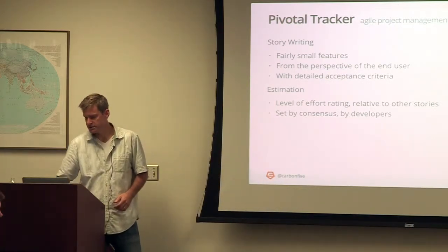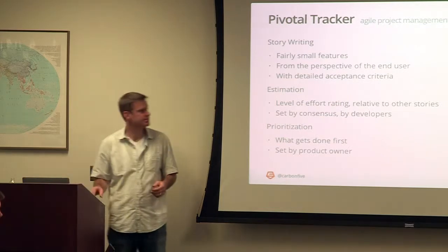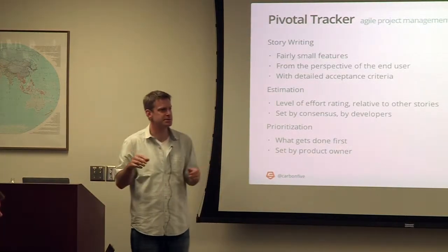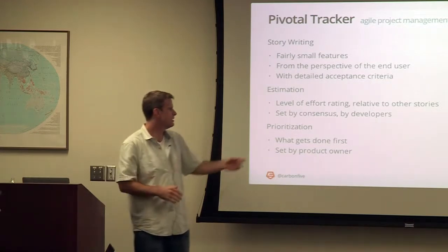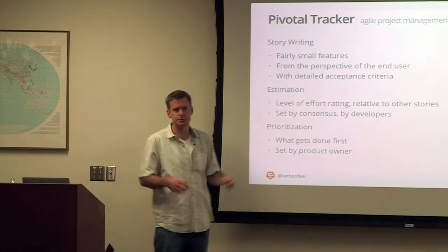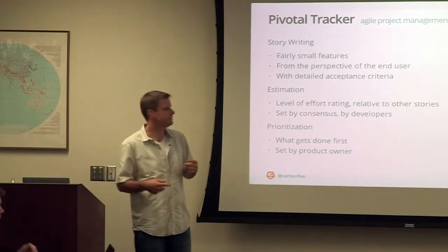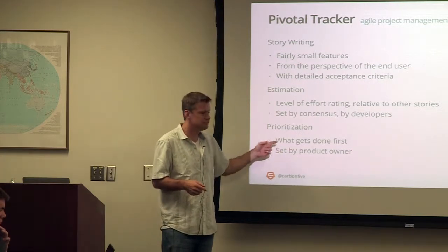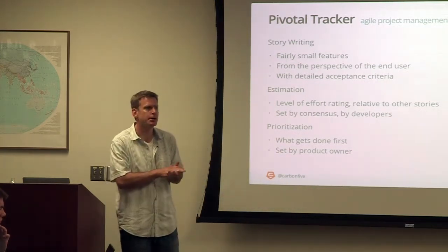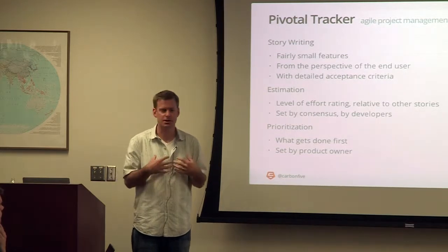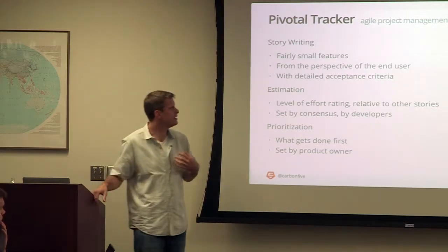So once you've got this stuff, the last piece of this puzzle, and I alluded to this, is that for the top 10 stories in a milestone or in a feature, you have to prioritize. The whole group writes stories, your business, your design, your developers estimate, and then your non-developers, or your product owner, essentially prioritizes. And this is a contract you can have with each other. It's a contract we have with our clients.